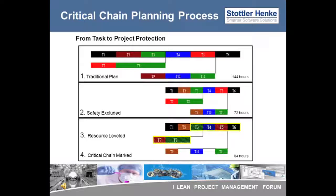After the safety has been excluded, resource leveling is applied to eliminate any resource conflicts. In this illustration, no same-color task should occur at the same time.